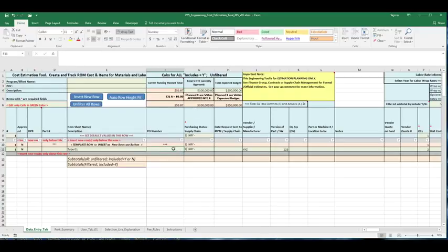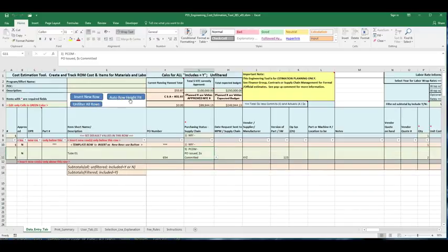So let's say actually we decided to purchase this thing, and it's in the buyer's queue. Someone's working on it to purchase it. They finally get a PO 654, and the PO has been issued. We're going to change that to PCOM, which is purchase order issued. I'm going to correct this height by hitting the auto row height.